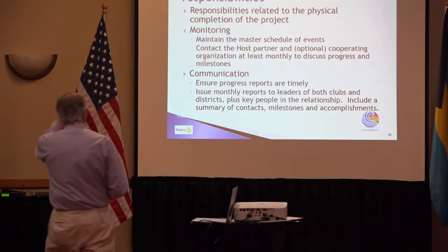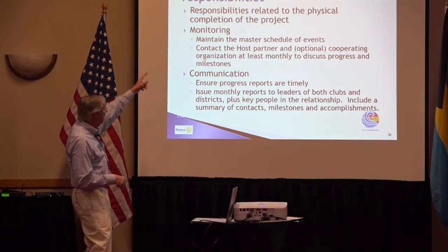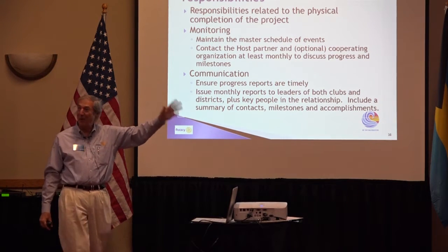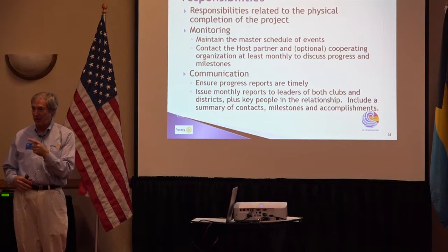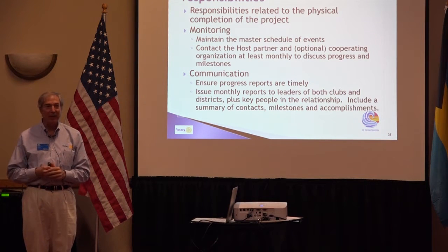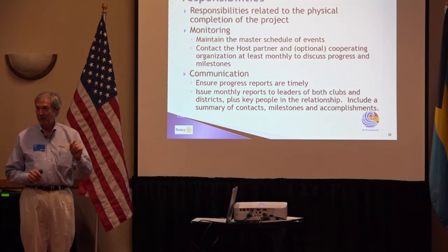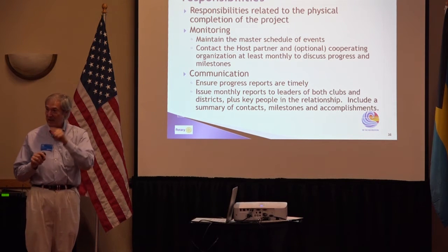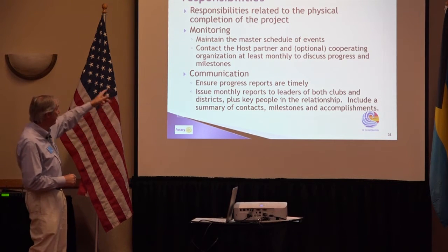But besides that, you've got monitoring and communication things, and this is my suggestion, little old me, that the international partner should maintain the master schedule, the big schedule that you put together with all of the steps. You should know where you are on that and which things are completed. There are a lot of cultures that won't do that very well, and in our culture, we can always find an engineer or an accountant who will do that to the nth degree. And we can do it. We can say, these things have been finished, these things haven't been finished, here's where we are on the plan. And so maintain that for the team.